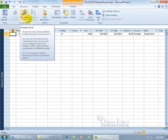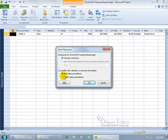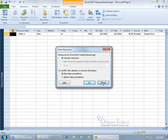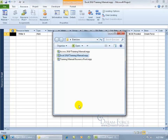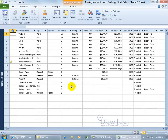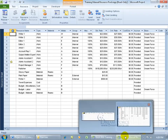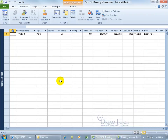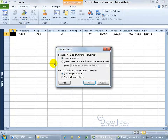To link Excel to the resource pool, come up on the Resource tab to the Assignments group, click on the Resource Pool drop-down arrow, and click Share Resources. The option to use resources from a pool is grayed out because the resource pool isn't open. Once it's open, you can select it. So let me click Cancel, go down to the Exercises folder, double-click to open the resource pool, and leave it in the default read-only so others working on connected projects can continue working.